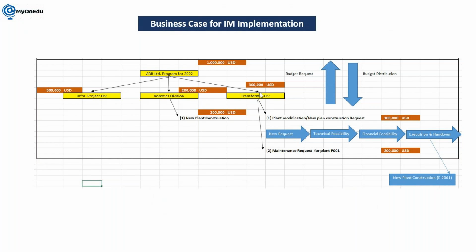Proposals means first requirement. Whatever requirement is going to be submitted, it has to be aligned with the objectives of the organization. It should not be anything unrelated. Whenever any proposal is submitted, the estimation has to be calculated, then feasibility has to be checked, and only then will these details go to the higher management. So the basis of the decision is taken from bottom to top, and then the top-level people will decide, yes, we are going for this investment, and only then will they allocate the budget.